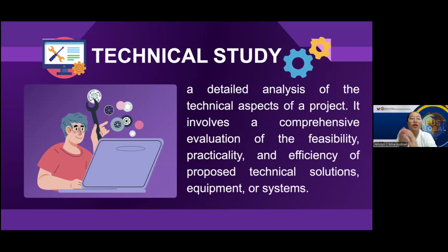For example, the students working on a solar panel assembly project conduct technical study. They started selecting. They choose an efficient assembly process, source components from local suppliers, and design a compact plant layout. Another is determining. They calculate labor needs, two skilled technicians and one unskilled worker. They estimate energy requirement and plan for safe disposal of electronic waste.